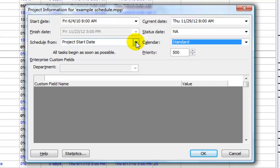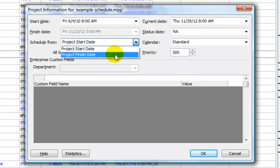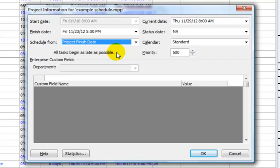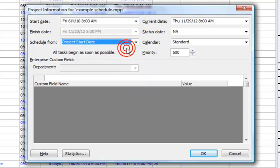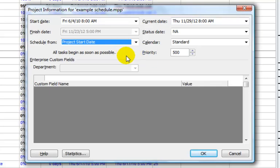You can also decide if your project is going to work backwards from a finish date, and then your schedule will calculate based on knowing that you need to finish by a certain date. However, it's not recommended that you set up your schedule that way. It's always a best practice to plan from where you are, get the estimates, and see how long it'll actually take. If you discover that your plan is moving past the finish date your stakeholders wanted, there are techniques such as adding additional resources or removing scope to meet the timeline.